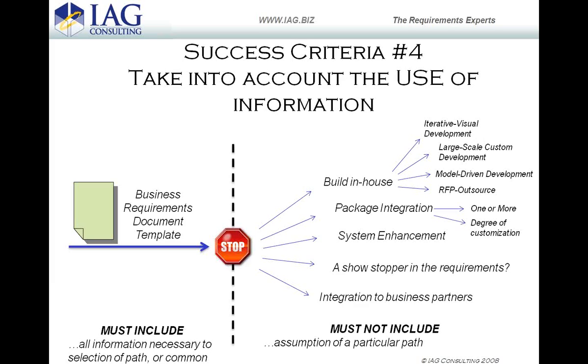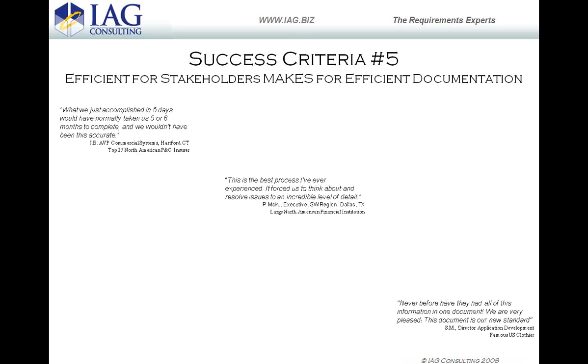What you may want to do is a couple of different things. The way you evolve this is you either teach your analysts to execute with more situational awareness. You put out a template that's very adaptive, but then you teach analysts what we call situational awareness. The second thing that we do is we build out playbooks for each of those other variations. So you've got a core, which is the template, but then you've got a playbook that you're executing depending on the subtype of project that you're dealing with. And there are a lot of very effective ways of dealing with this, right? But you can separate the two so that you're not trying to collect a bunch of bogus information.